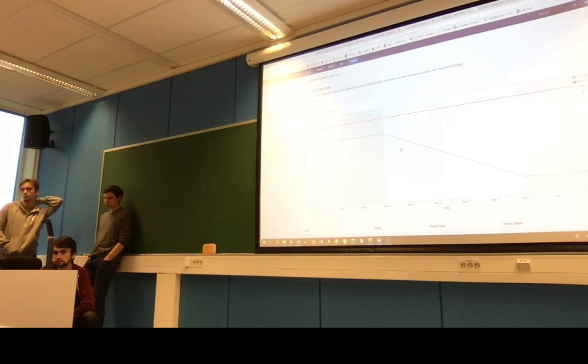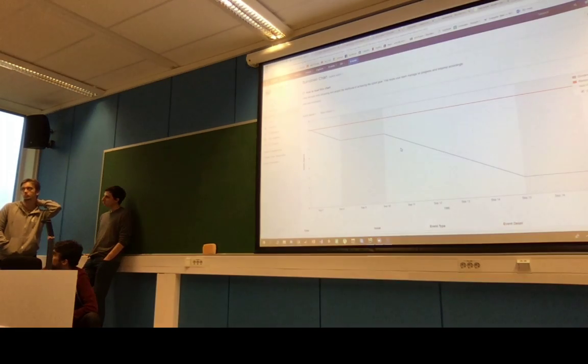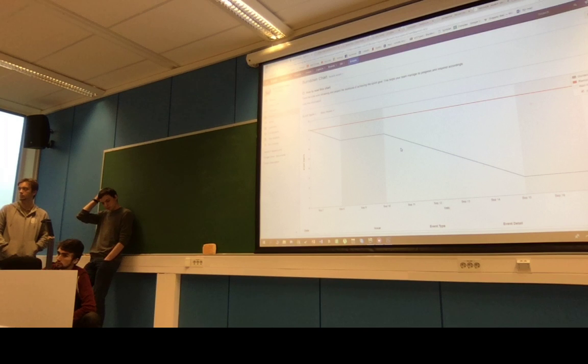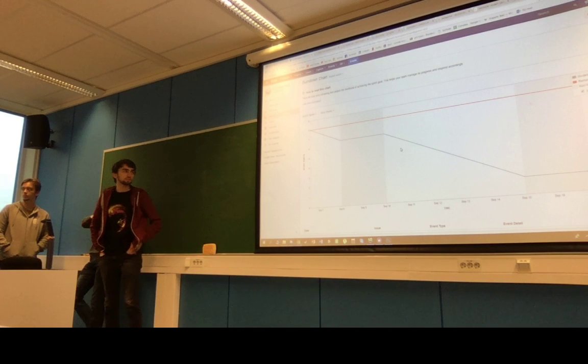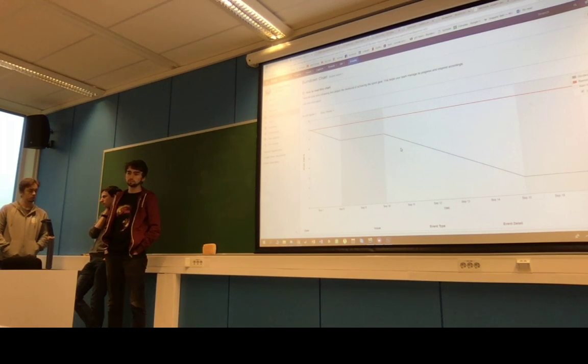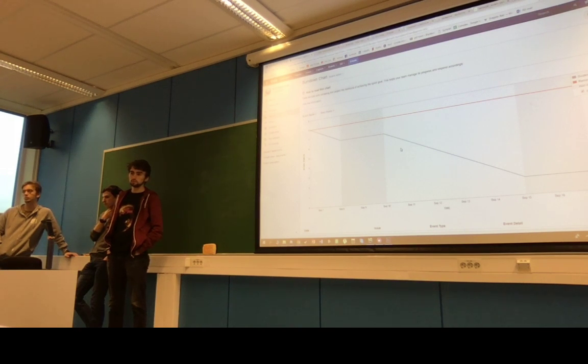Yeah. I also think that when we say one story point is 4 hours, it makes it really hard to estimate sub-issues. Yes. Because if you have one issue, which you say is one or two story points, it's really hard to say when it has like six sub-issues, that this is 0.2 story points or something. That's so right. So we have to look into that because the sub-issues aren't estimated.